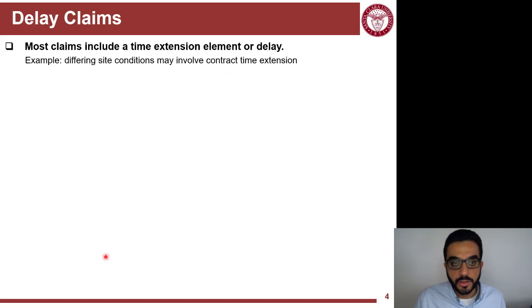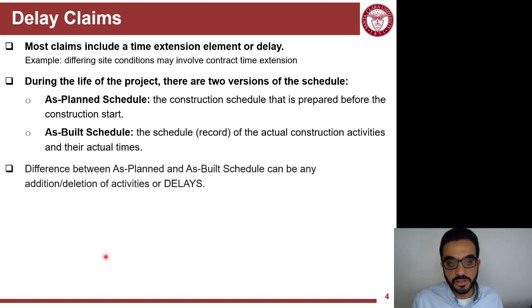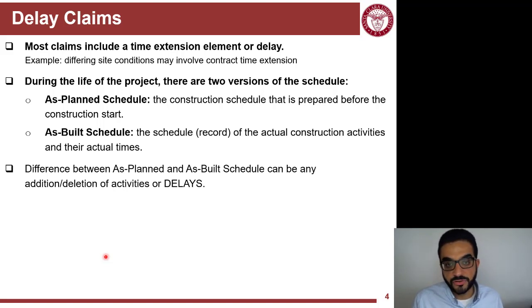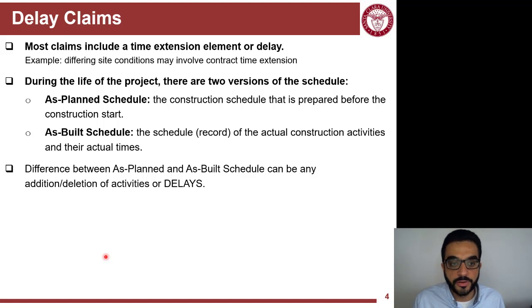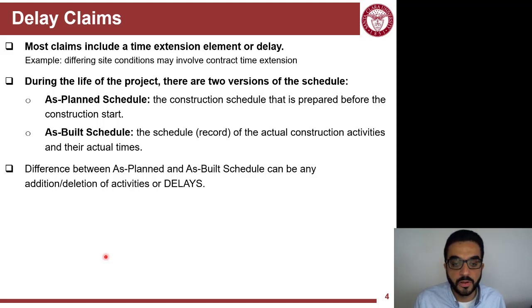Delay claims mostly have time requests to extend the schedule of the project by the contractor. The issue is how to calculate these time extensions that the contractor has the right to. To do that, you need some information — this is another proof that documentation in construction projects is really important. You need to have a record of the as-planned schedule and the as-built schedule.